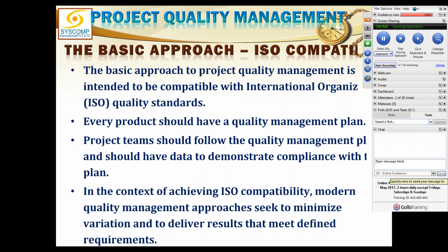Right? If you say 2000 psi is the requirement, what is the acceptable limit? Maybe plus minus 5 psi. Agreed or not? No matter if a thing is created by a machine, no two items can ever be 100% consistent. This is a rule of nature. You cannot have 100% consistency anywhere in the universe. So you can define the closest they can be to be called consistent. So I say 2000 psi is my requirement, but plus minus 5 psi is acceptable to me.